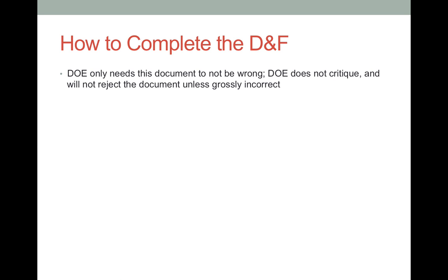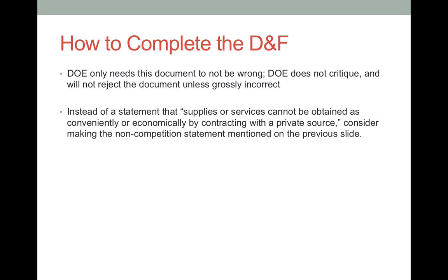DOE will not review the DNF for content other than to verify that the document is for the acquisition being requested. If there is a different IAA number, or a ceiling that has been exceeded, or a period of performance that expired, DOE will probably not accept the document.